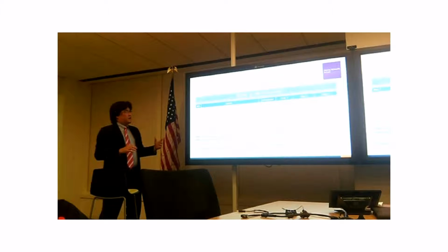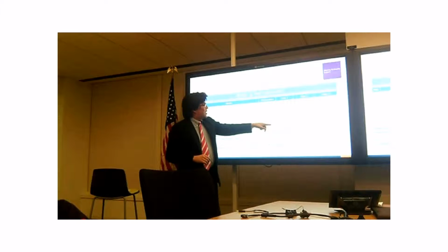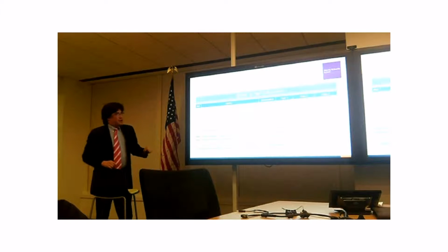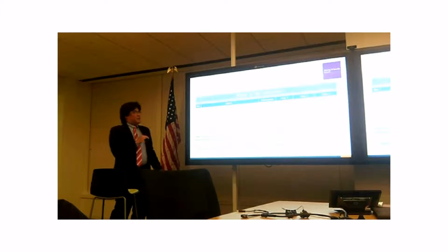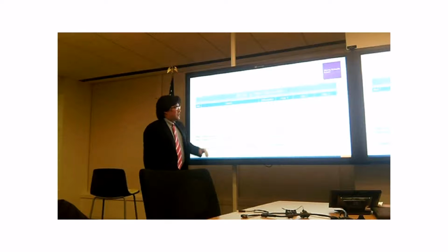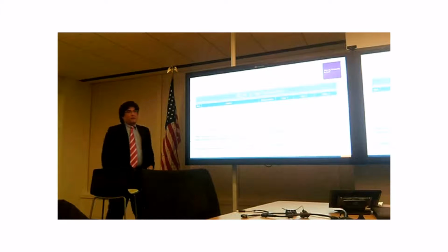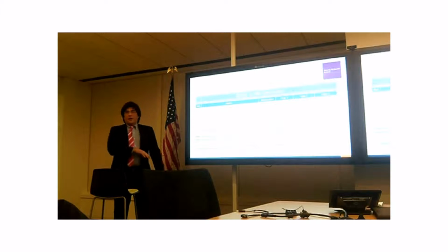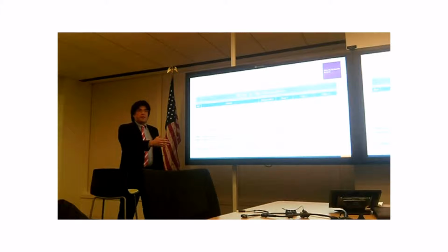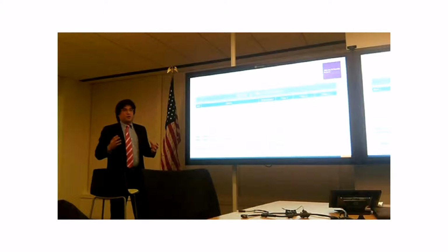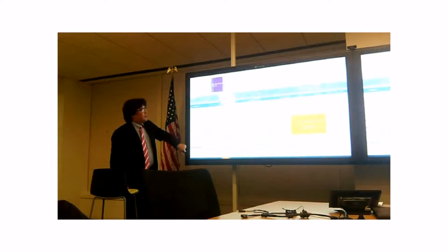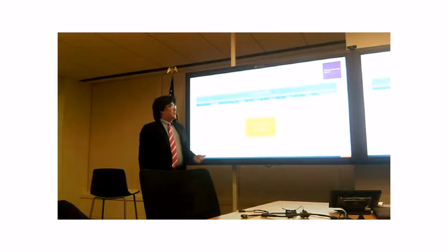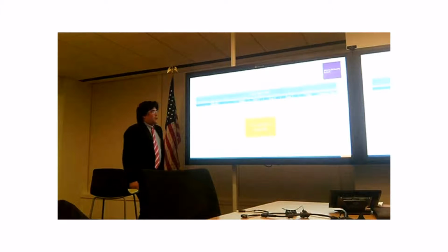And the reduced headcount here is about the total of these numbers. So it's 3 times 130, 4 times 95. You sum those up. Again, you add a risk adjustment here of 10%. And let's say that you as an organization don't feel very confident with these estimates. You put that number at 35%. But you build a scale that's consistent, because you can't say this is 35%, I'm not confident with that, and in the previous cost, say I'm not confident with this number, it's a 10%. Your scale has to be consistent across, because that will give you the story you need to tell. Okay, so in terms of total benefits, we've got about $4 million in benefits. And if you want to look at it from a present value perspective, that's $3.2 million today.